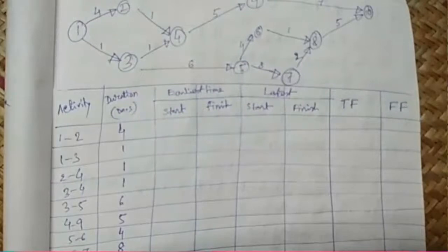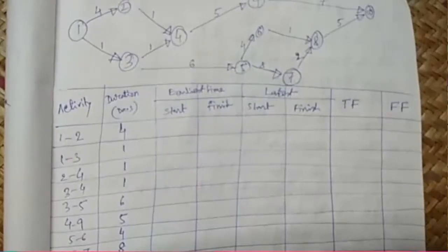Then our job is to write out the earliest start for all the activities. Now if you look at them, look carefully, we'll start from the left. That is, for earliest calculations we will go with forward pass calculation. If you remember previous day's class, for earliest time analysis or forward pass analysis, we start from the left and go towards right.